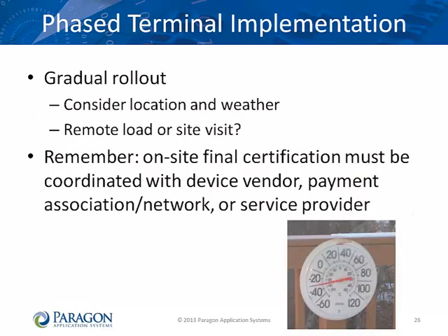When you are putting together your terminal rollout schedule, consider location and weather. You may not want to be installing new drive-up ATMs in northern Minnesota in January. Depending on the ATM software you use, you may be able to download all of the updates to your ATM, or this may require a site visit, since some ATM software does not allow you to install or update an EMV kernel remotely. If you have many ATMs to update with site visits, this will take a while and you will have lots of service charges.